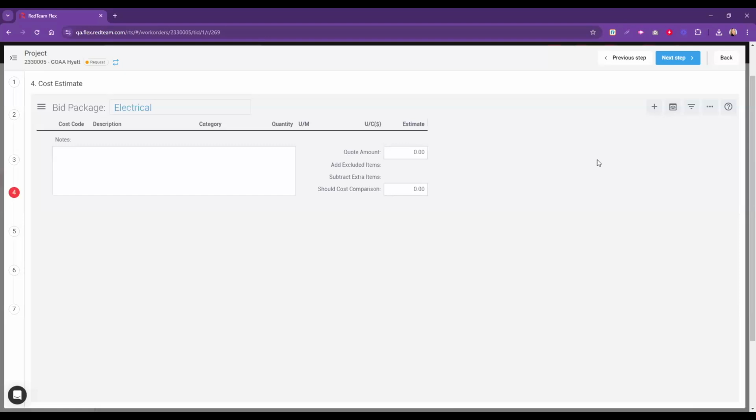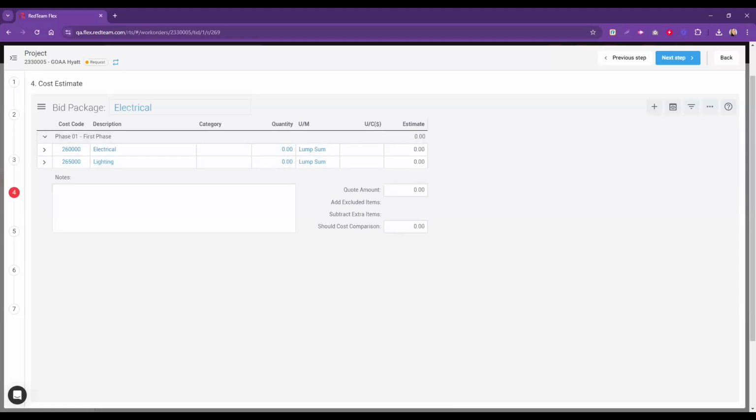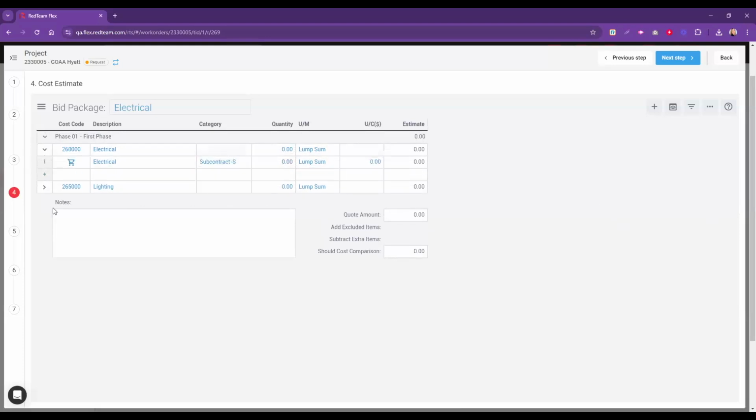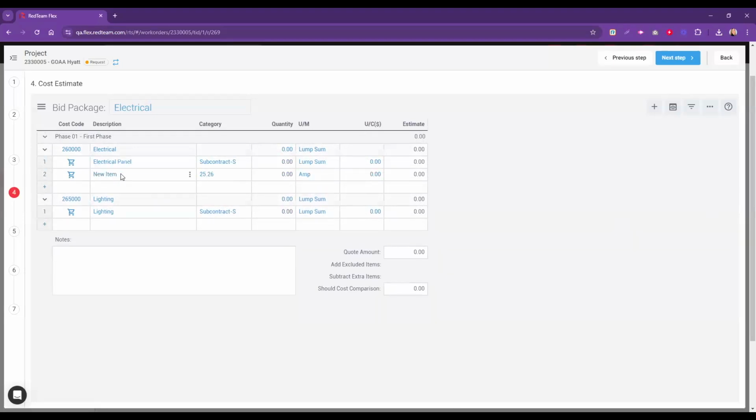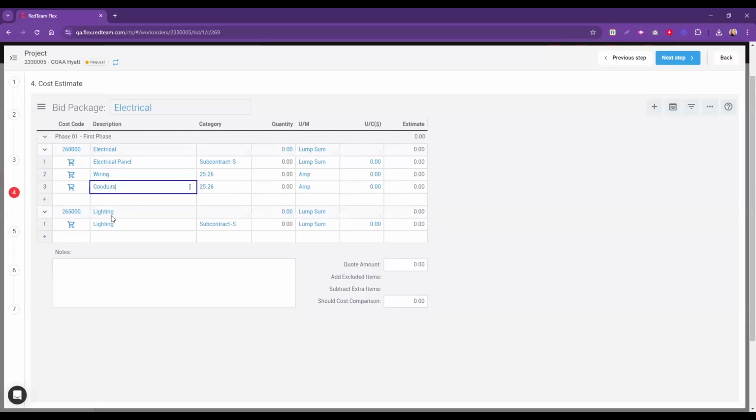And you have the ability to break that down with more detail once they've been added. So adding them here is kind of only the first step. From there, you kind of go in and start adding more detail. Again, this could have been done in the estimate, and I could just be pulling this in if I wanted to. But the whole idea is to get pretty detailed. This is one of those tips we talked about: the more you break it down, the more the bidders can exclude from their numbers. Keep adding some items here. Go down to my other item, right?